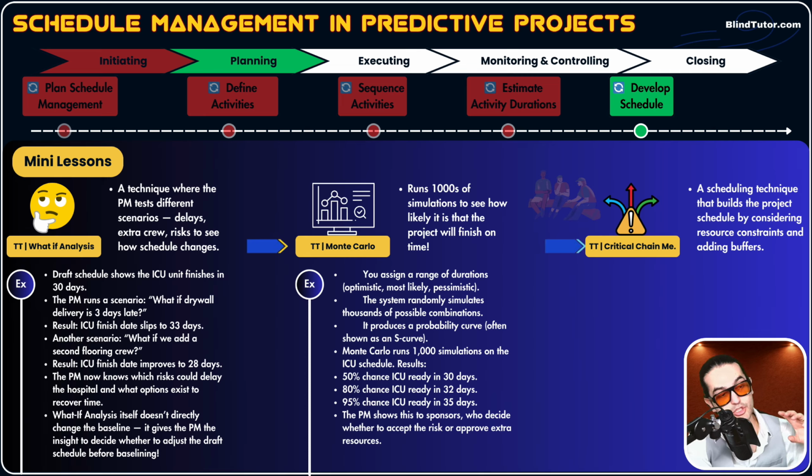So consider the duration of that activity 7 days. We add buffer to be on the safe side. Now, critical chain method says, hey, you know what? Do not add a contingency buffer or reserve to each activity. Instead, let's add contingency buffer to the whole project, to all activities at once.